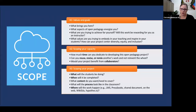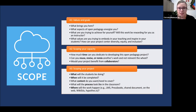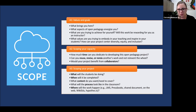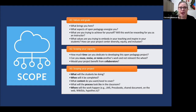Once you've scoped your values, we ask you to scope your capacity. Capacity includes how much time you really have, where you might benefit from collaborators, and thinking about ways to maximize your time by looking for OER that might already be available. The final piece of scoping is about beginning to define the parameters of the project itself — what do you want the students to do, how, and where. As you complete the other elements of the roadmap, you'll continue to flesh out the elements of that project idea.